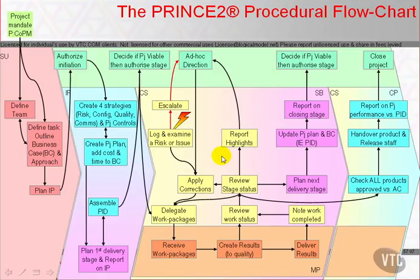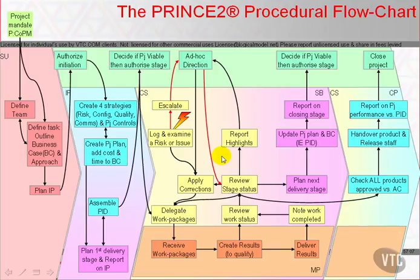The project board may consider the matter acceptable within current arrangements, or they may amend current arrangements within their authority — both of which result in corrective actions. Corrective actions amend, delete, or add work packages within the current stage's scope.